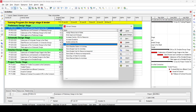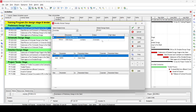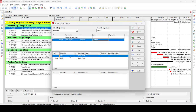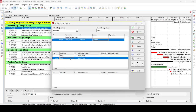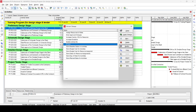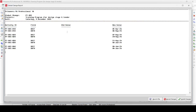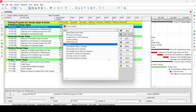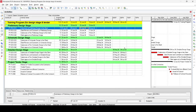Go again to Global Change, Modify. This time if WBS name contains 'Detail,' then Detail Design Start equals Early Start, and Detail Design Finish equals Early Finish. Apply changes, proceed — all old values are zero, and the detail design stage activities show four activities with start and finish values. Commit changes, skip the log file, and close. The detail design stage dates are now filled in.